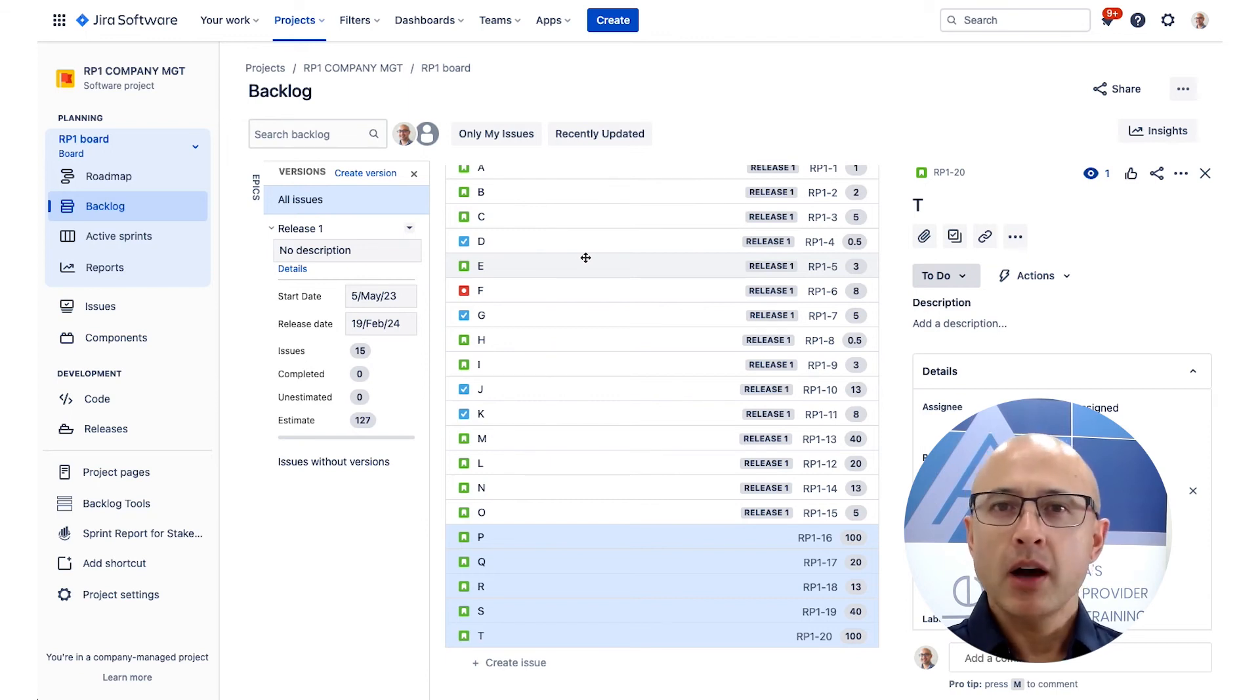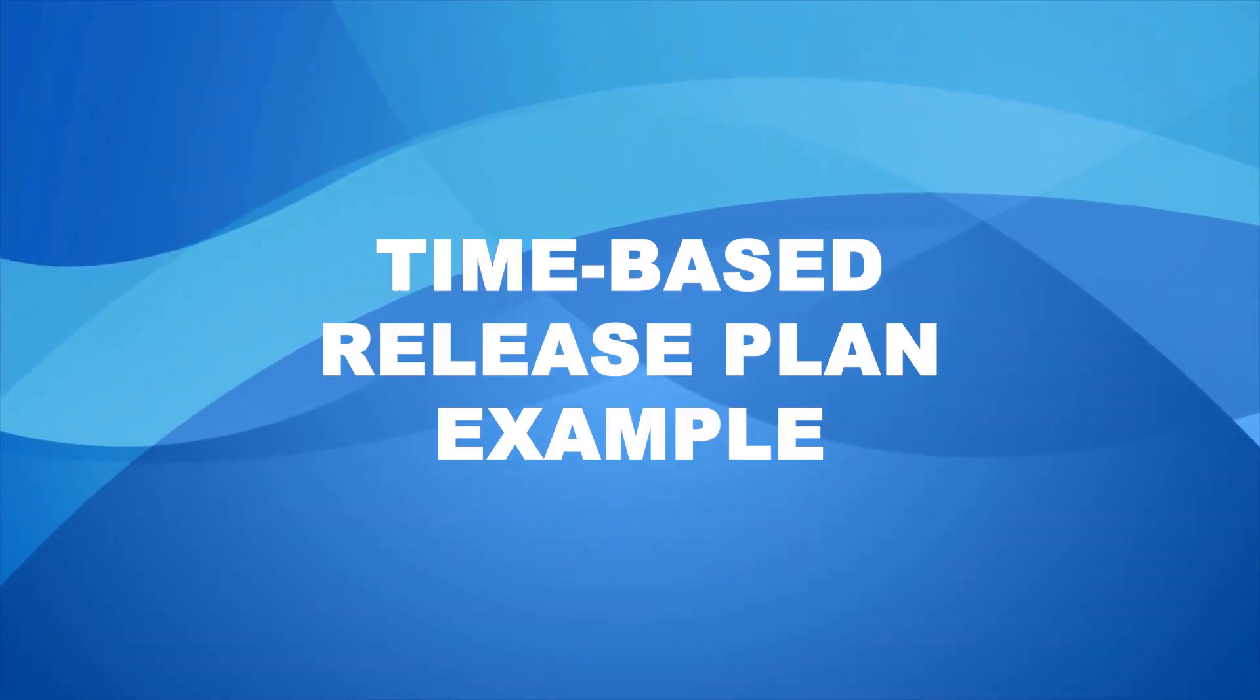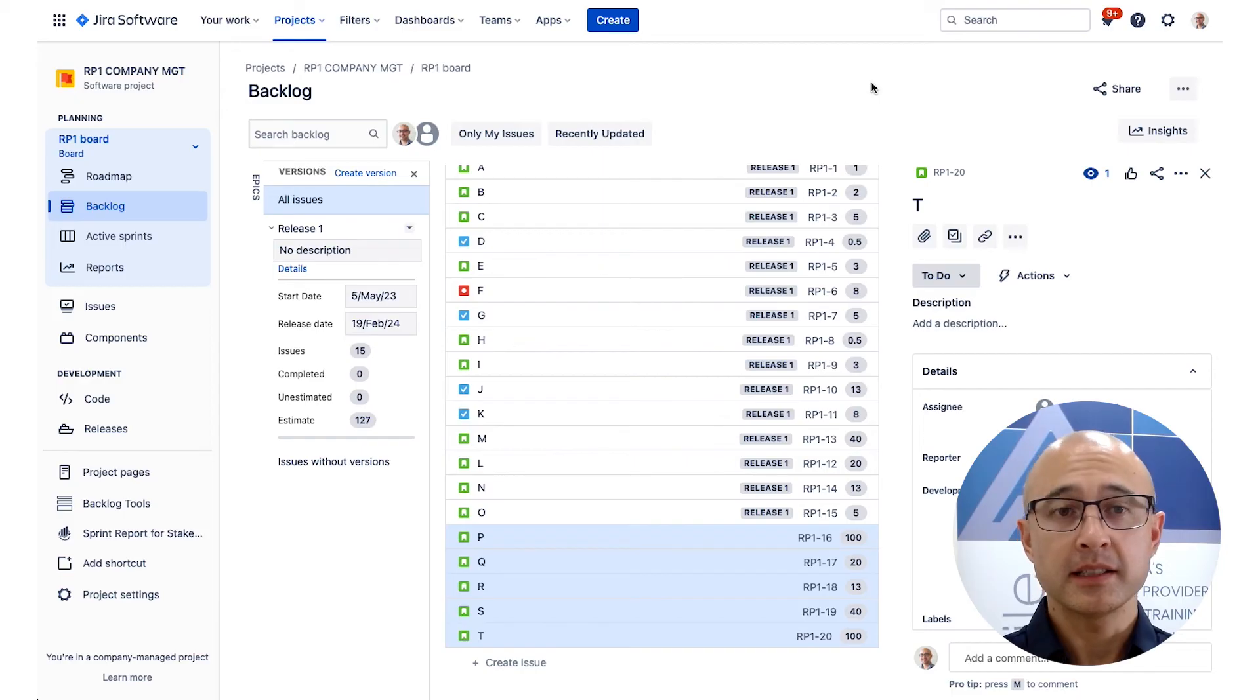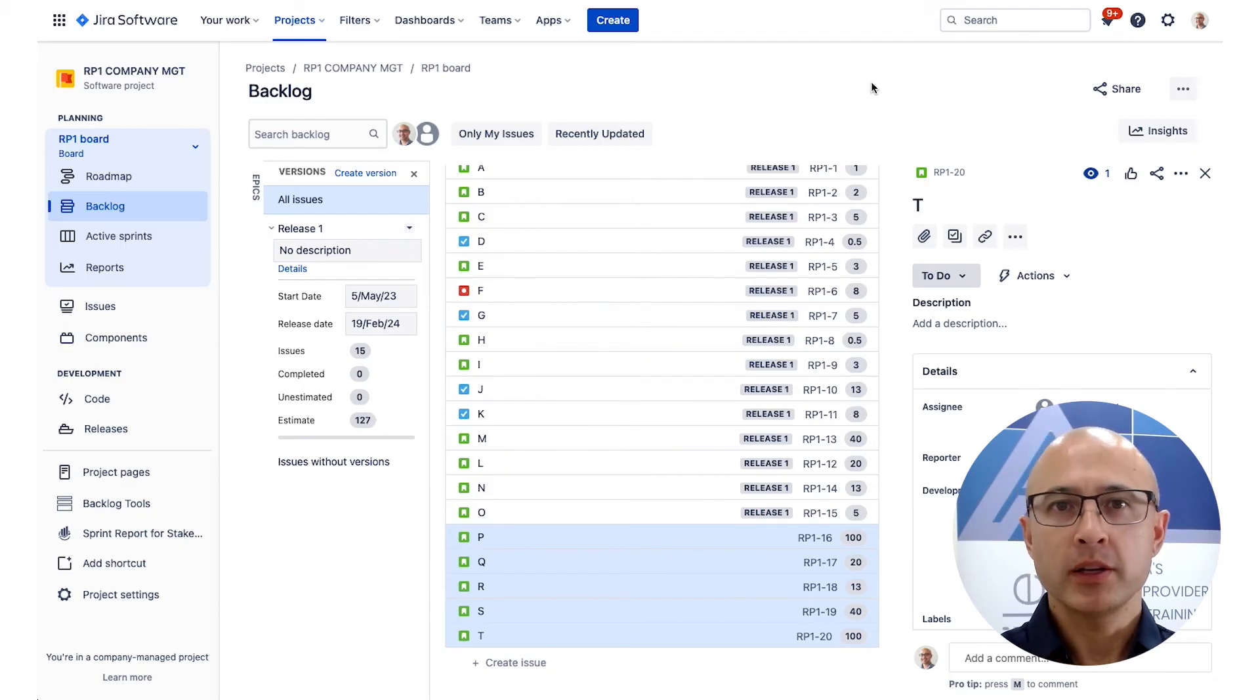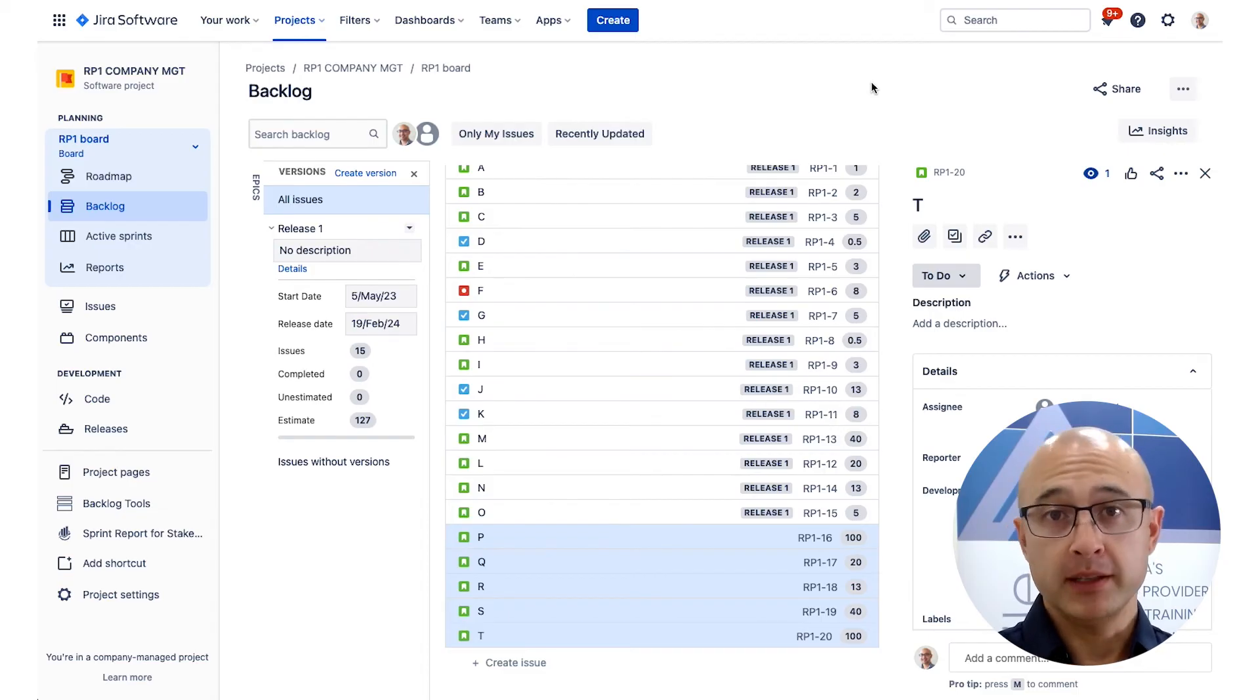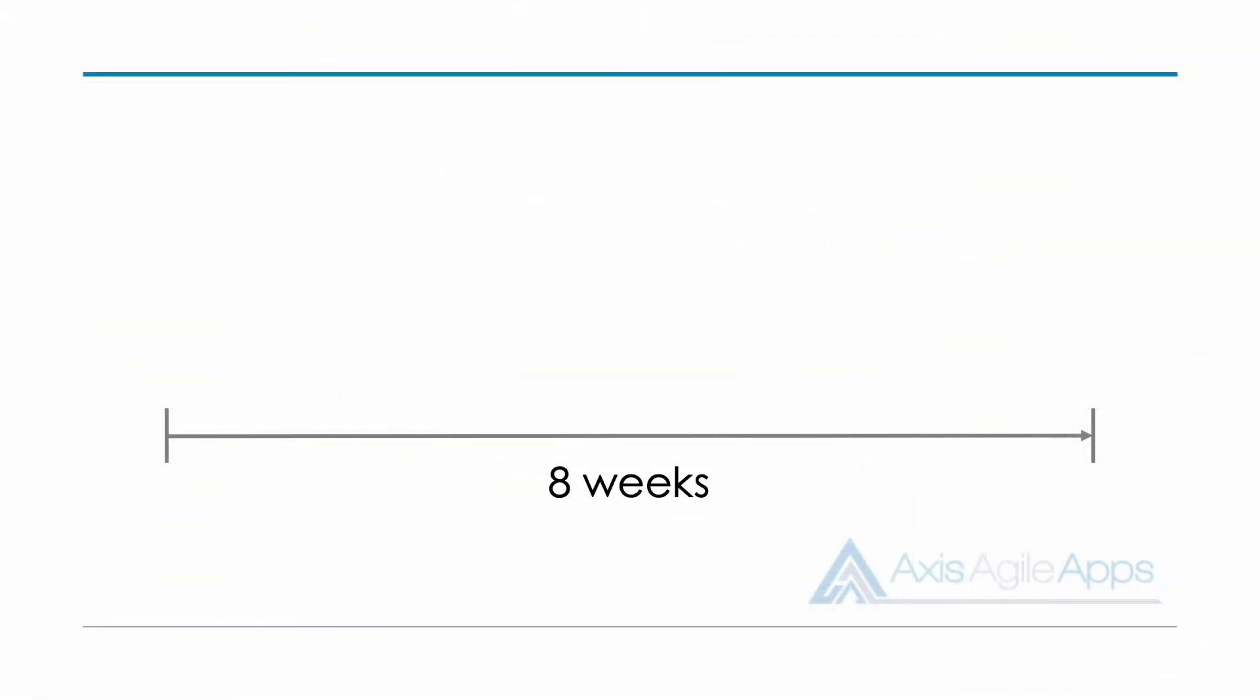What about a time-based release plan instead? Okay, let's look at that. So let's imagine that our stakeholder instead said, okay, you've only got two months. That's all that we can dedicate to this particular release. What can you get done? So what are we going to do? Well, firstly, we need to figure out how many sprints we can achieve within the two months. So let's say two months is approximately eight weeks, and we're doing two weekly sprints. So what does that mean? That means we're going to achieve about four sprints or so.